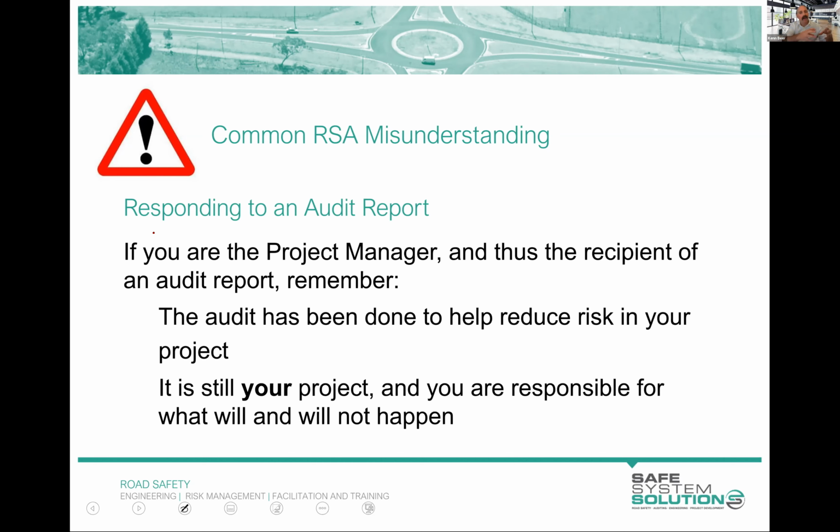You say, I agree that there's an issue here, but grade separation is going to cost $28 million, and we are doing a small local government upgrade to this intersection. So you can say, we agree this is an issue, the resources to grade separate are far beyond what we could ever afford, and we will reduce the risk through these measures which directly address those concerns. Of course, you're not going to get something that ridiculously extreme, but it comes to the same point with other issues.